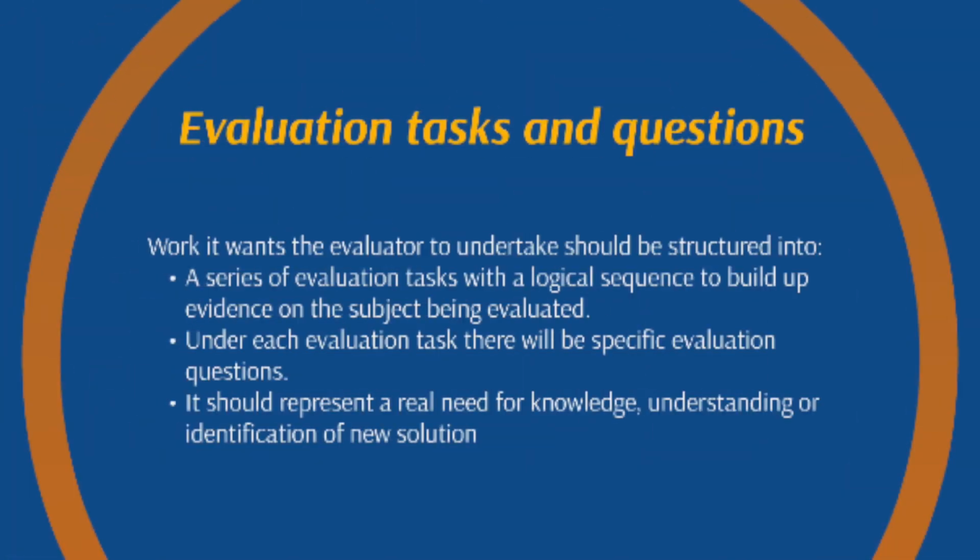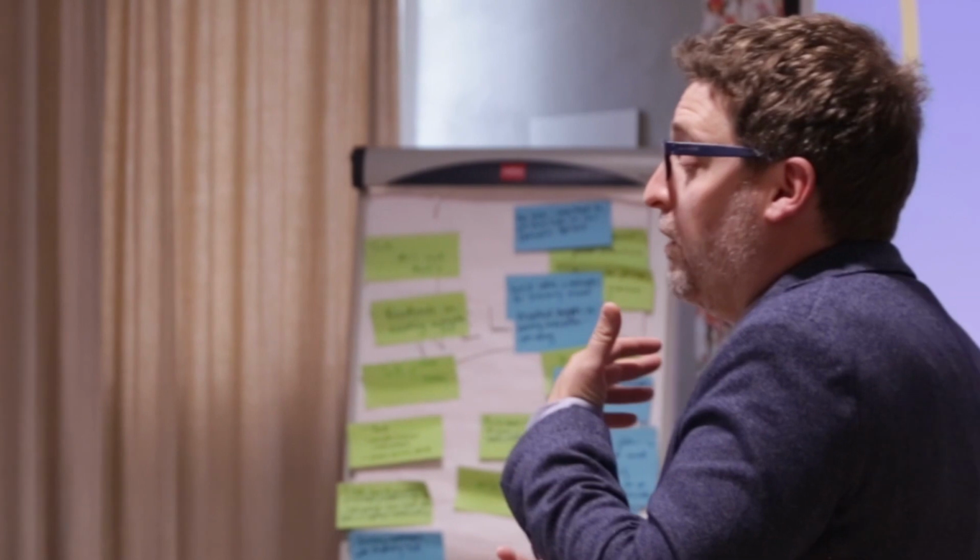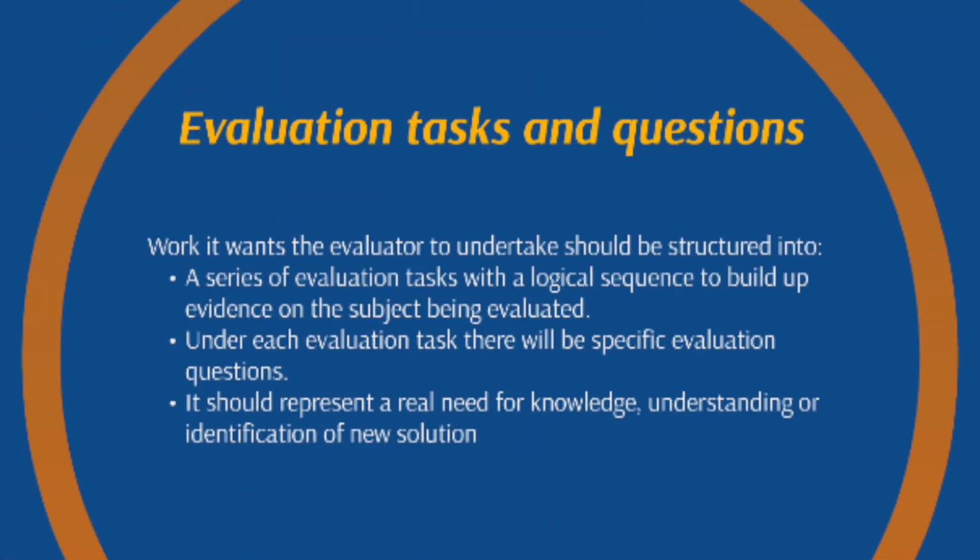That's also a way you can control the flow of the delivery of your evaluation, that you try to define tasks which are really separate and can be looked at separately from each other. On the other hand, it's very important that the questions which you raise are specific enough that the contractor can answer them, and can come up with a possible methodology to address it.